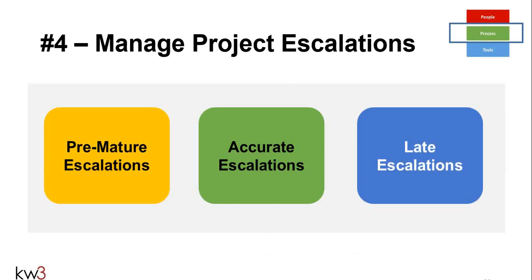These are escalations normally when we have team members that were managing a project and we think the projects are on track, and then all of a sudden we find out that either one team member or group of team members are behind on a deliverable, and that deliverable has a high dependency on the timeline, and thus there's an impact to budget, timeline, and resources.